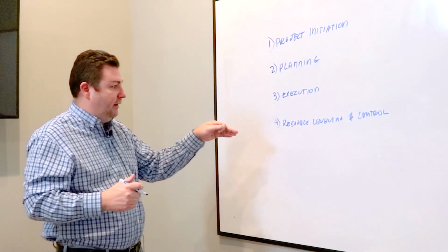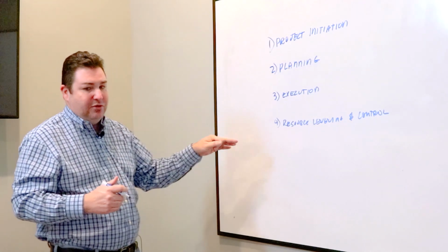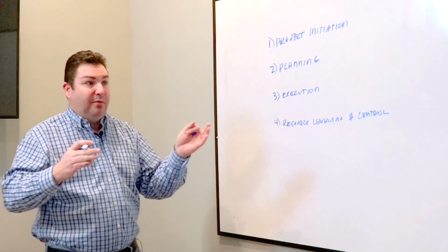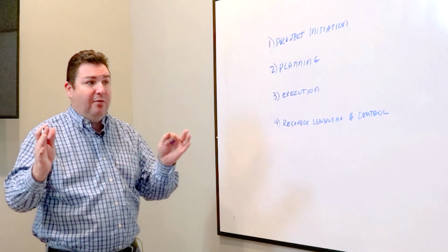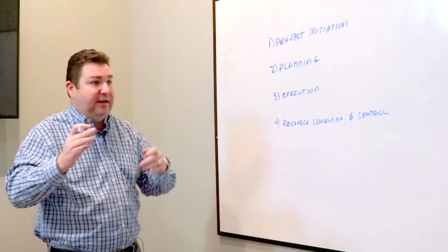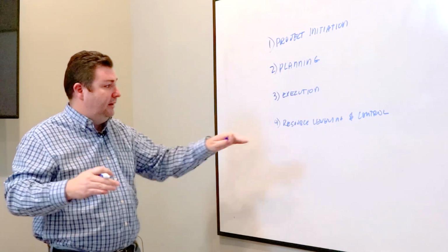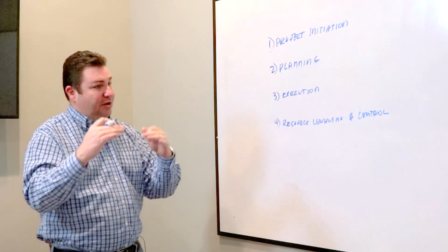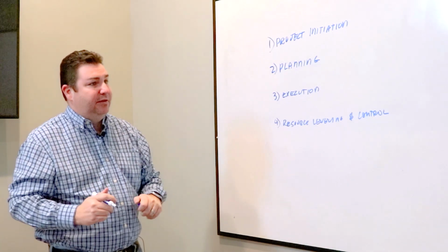So in the resource leveling and control aspect of this, you're measuring that ongoing activity. We're looking at performance to budget and performance to schedule, right? So how well are we sticking to what our original schedule was? And then we're adjusting and shifting resourcing. That whole resource leveling and control, what is that? It's understand it, adjust, manage, and apply that to the overall model.